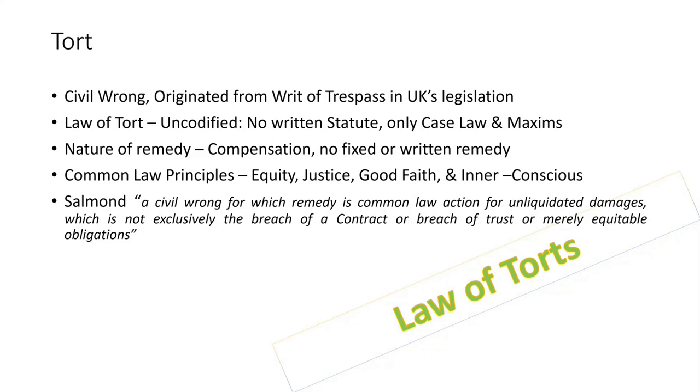Your contract also has this clause, limitation of liability. That in tort cases, it is unlimited. Okay, because it's public, you are doing something to the public. So you have to pay accordingly. Our 100% liability cap is not for the tort cases. So not exclusively the breach of contract or breach of trust or merely equitable obligations.